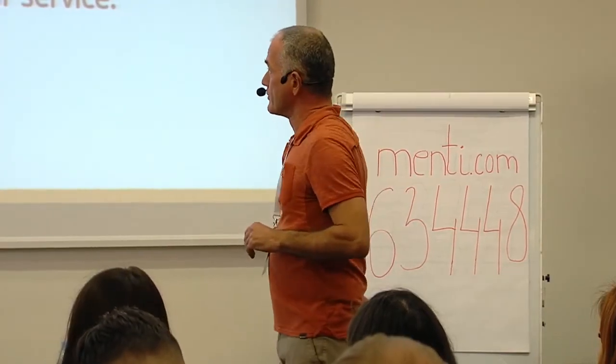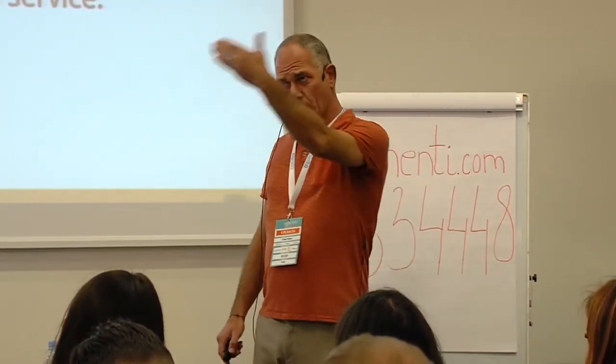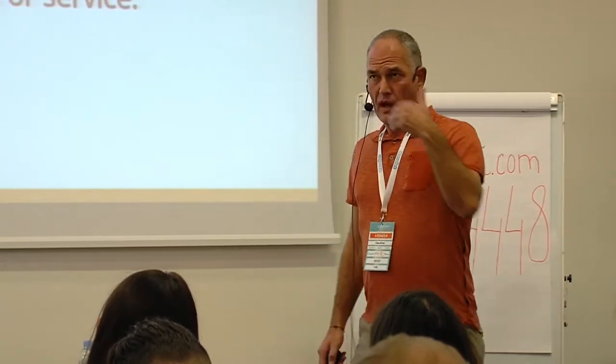Also something different. In some situations, there was no sprint planning. OKRs were used, meaning we plan over a period of 3 months, objectives and key results. What do we want to accomplish? How do we measure how far we got?